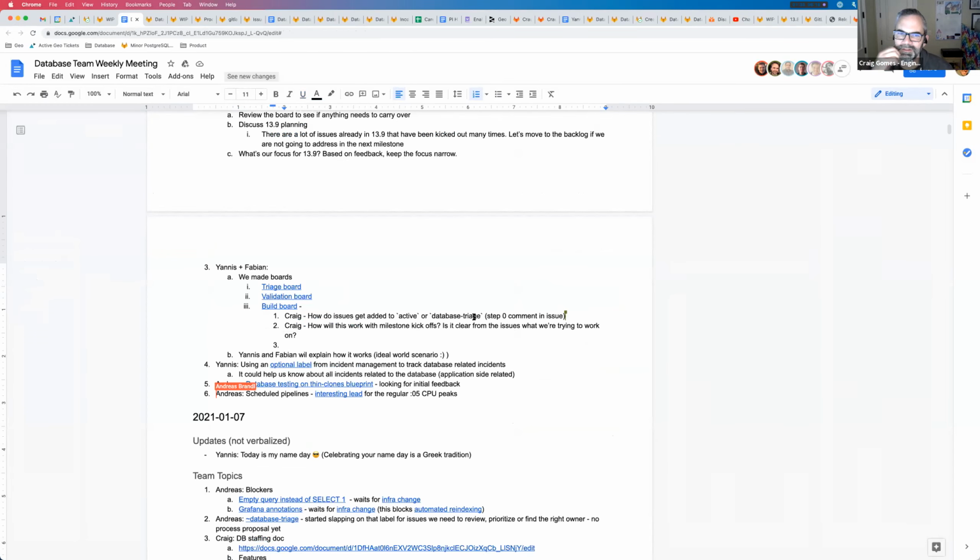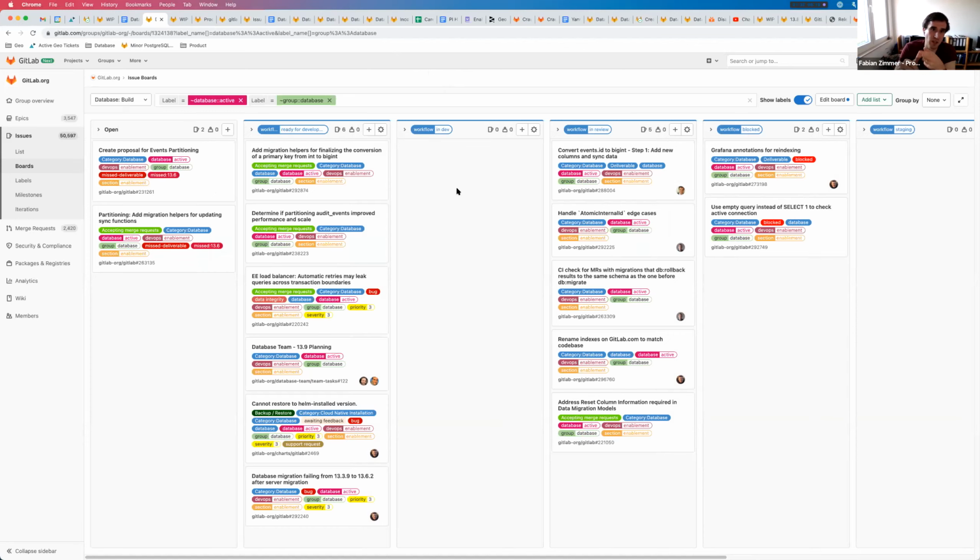If we have epics, this is a hypothetical now, and we know an epic has 10 issues, and we've decided the next 3 issues are A, B, C, and they're all in dev, then this column here, the ready for development column, will get smaller, right? And at that point, we need to decide, okay, given our priorities, what's the next thing here, right? And then you just apply the label and you fill the ready for development column.